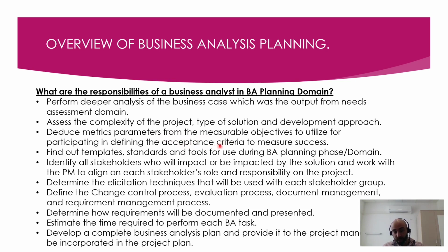And we all know, before we move on, that the business analysis plan will be signed off by the sponsor and also will be a subset of the project management plan. As we said, this work, the business analysis planning, is a subset of the holistic project management plan.